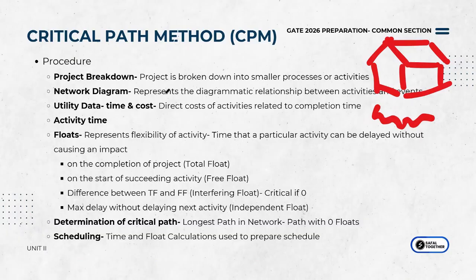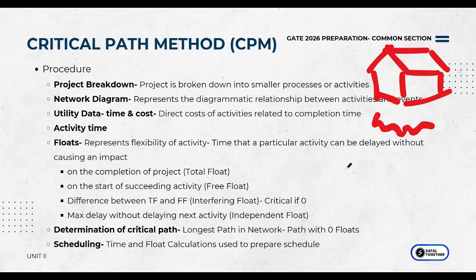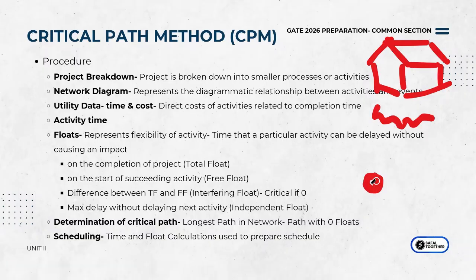You create a network diagram where you talk about the relationship between all of that. So, say for example, you cannot build the superstructure unless your substructure is complete, right? So automatically that becomes your activity that you complete first. Your subsoil and substructure becomes your first activity. Once you're done with that, you come to the superstructures. Okay, so this is how you lay down the network.